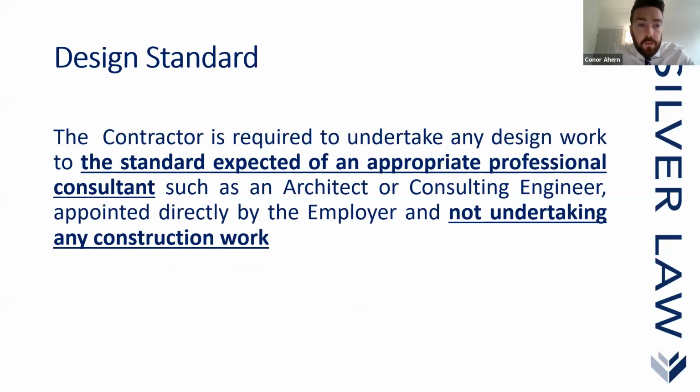So what is the design standard? The contractor is required to undertake any design work to the standard expected of appropriate professional consultants, such as an architect or consulting engineer, appointed directly by the employer and not undertaking any construction work. So basically, the design standard required from the contractor is the same as the employer would expect from an architect or a consultant engineer, or if there are M&E elements, a mechanical electrical engineer. The contractor is required to meet the same standards as those other independent professional consultants.